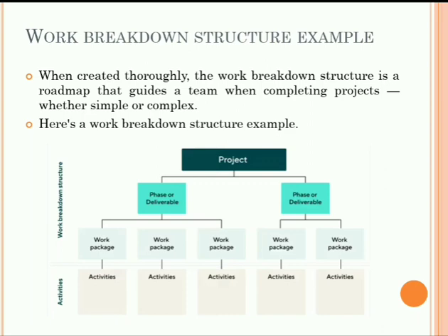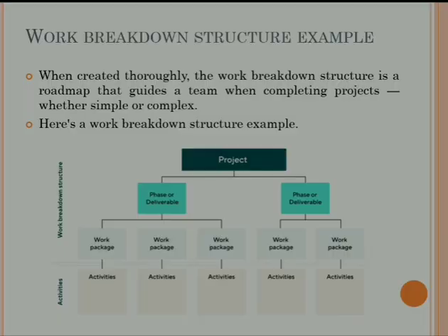Okay, creating work packages. In this, take your deliverables and break them into every single task and subtask that is necessary to deliver them. Group those into the work packages. This is creating work packages. The sixth and last step is choosing task owners. With the tasks now laid out, assign them to your project team. Give each team member the work management tool, resources and authority they will need to get the job done. This is how the task owners will be chosen in this work breakdown structure.